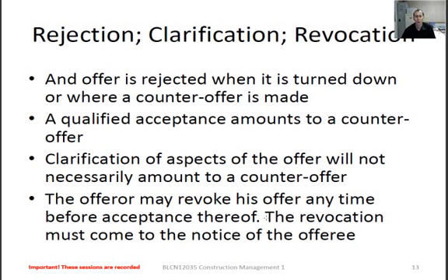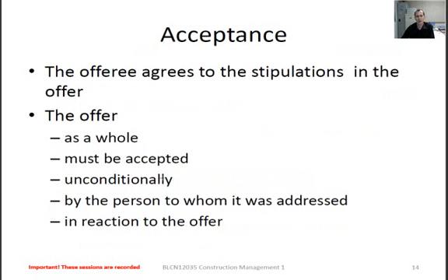The second point there, qualified acceptance. Right, so with qualified, what do we mean? It means we'll accept this offer that was made based on the following conditions. All right, so a conditional acceptance amounts to a counter offer, therefore effectively removing the offer from the table. All right, so that's important as well for us to remember. It might come back later. All right, so any questions so far?